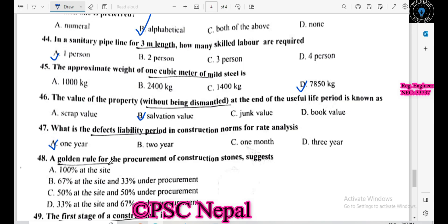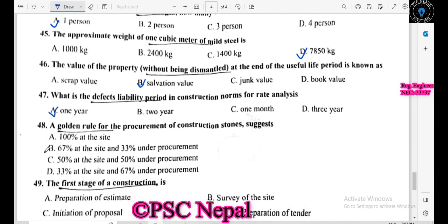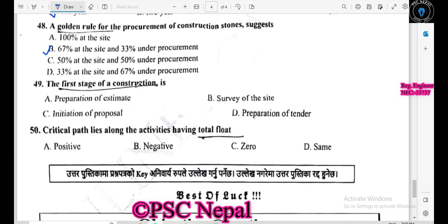The golden rule for the procurement of construction materials is rate analysis. The first stage of construction is known as the initial proposal. The critical path lies along the activity having a total float of zero.